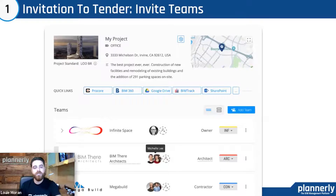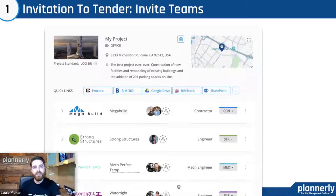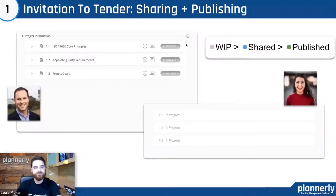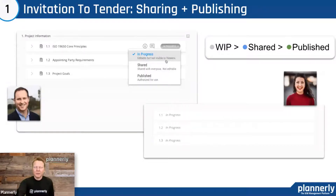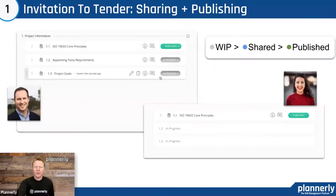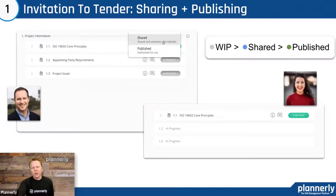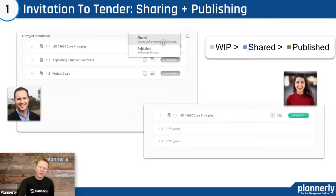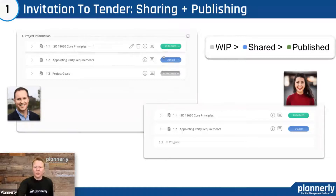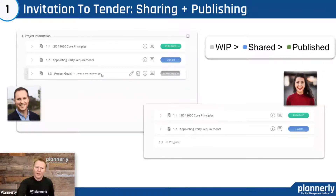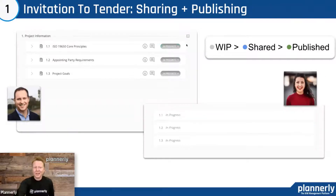Getting teams invited to the tender is an important step. You can control what people see — specifying which documents they have access to and sharing only certain parts. Following the ISO workflow of work in progress, shared, and published, we can control that at the document level and assign sections to specific parties.